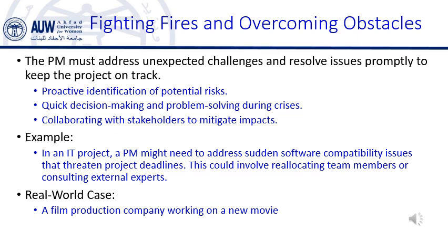Example: imagine a marketing project where the design team is late in delivering graphics needed for a campaign launch. The PM quickly evaluates the situation, communicates with the team, and determines that the launch can be postponed by 1 week to accommodate the delay. Alternatively, the PM might bring in additional designers or adjust the campaign schedule to make up for lost time.